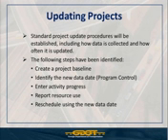But the data date in Primavera terms is the same thing as what in Artemis is referred to as time now. It's the concept of the point in the schedule at which everything is updated, right? So everything's updated as of that date for the schedule. So establishing a new data date, entering activity progress.